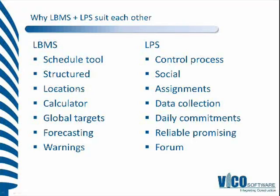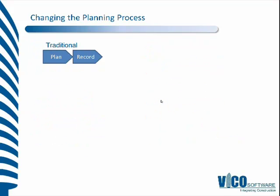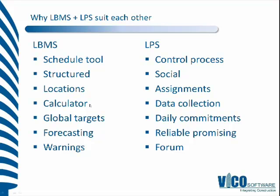Then we look at locations. Locations being clearly defined in the location-based management system improve the activity specifications, so the assignments are a lot more efficient when showing where people are working and how they're working through those locations. We also talk about using locations for planning continuous assignments and collecting production data early, using a calculator to more scientifically crunch that information for more accurate starting data.